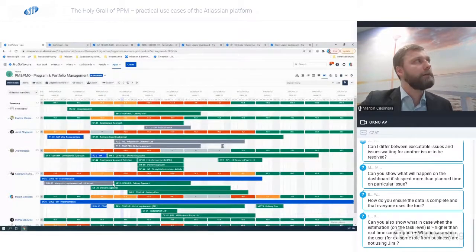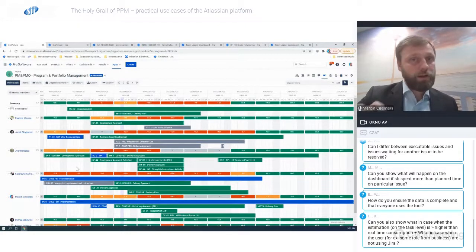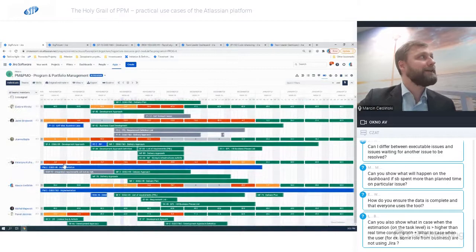Okay, let's see. If we prolong it, okay, she's a little bit overloaded, but it's not much for the first 2 weeks. So for week 45 and 46, she is more overloaded on weeks 49 and 50. So we probably should do something with that. Again, maybe we can prolong the task. Maybe we can assign the task to somebody else. So this is the way it works for different skills as well. And we're gonna talk about the skills in a second.